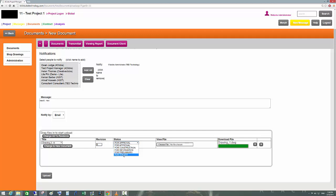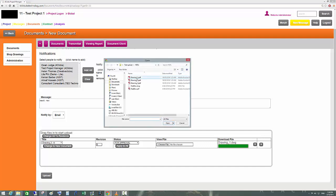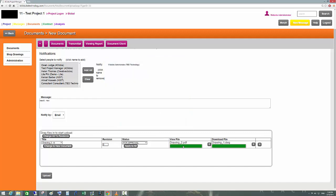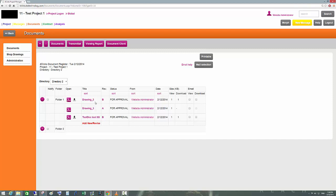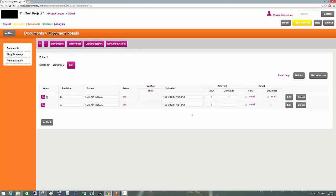In this case we select Drawing 2 with revision A and set it to revision B. We can also select the status — whether it's for approval, information, or for construction. All statuses are customizable so we can add more. We can browse for another file if required. Now we have Drawing 2 as revision B, and we hit Upload. We can now see Drawing 2 uploaded with revision B containing both PDF and DWG. To track revisions, click on the revision column to see the full history — WebSpace always shows the latest revision in the document section.